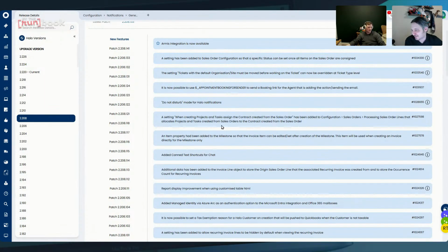That's what it's saying. Yeah, and often it comes down to the time as well, making sure the time ends up in the right place. Often we find people who are what we call double dipping on time, right? They have all their project time being paid for as part of the project, but then all the time also hits an unlimited or all-you-can-eat contract, and then their MSP contract looks not very profitable because they did 10 grand of project work which hit this agreement that it shouldn't have hit.